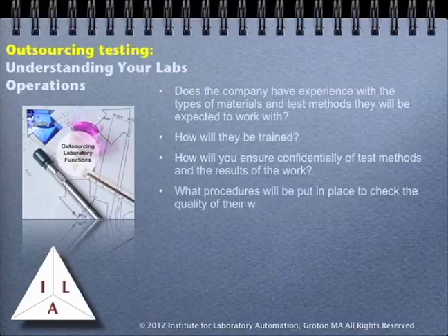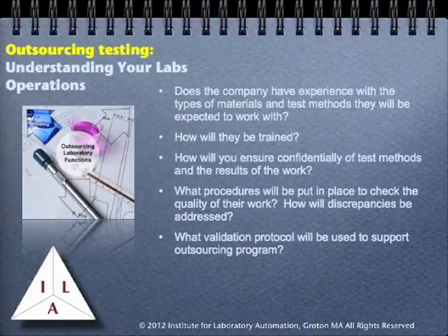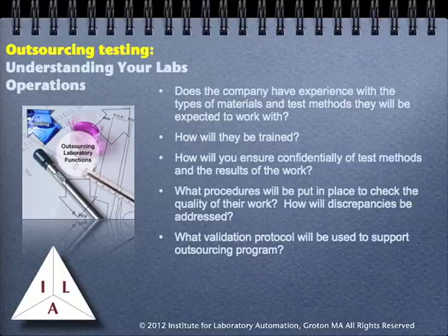What procedures will be put in place to check the quality of their work? How will discrepancies be addressed? What validation protocol will be used to support the outsourcing program? This is a process, and like any process, there need to be checks put in place to make sure it is implemented properly and working. In addition, when you choose a company, you need to carefully evaluate them. In effect, do a vendor audit to ensure that they are capable and have the reputation for doing the kind of work that you need to have done. Because it's not just their reputation that is on the line, it's yours as well.